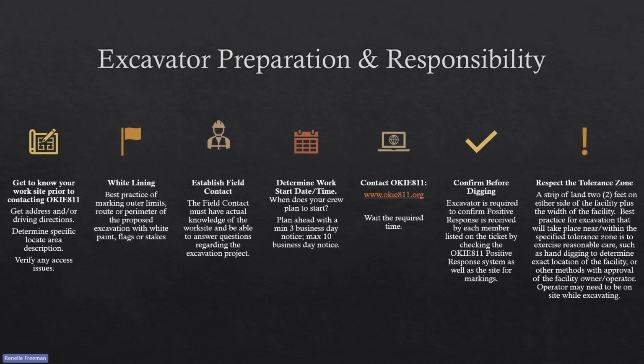And then you'll want to confirm before digging. So the excavator is required to confirm positive responses have been received by each of the members listed on the ticket, and verify there are markings on site as well.